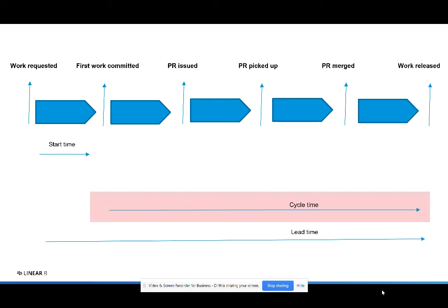Within cycle time, there are a number of phases that are important to track as well. The time it takes your developer to work on the new feature and issue the first PR, we call coding time. After the PR has been issued, the time it takes for it to get picked up is pickup time. After the PR has been picked up, the time it takes to go through the review process, make changes, and merge that branch, we call review time.